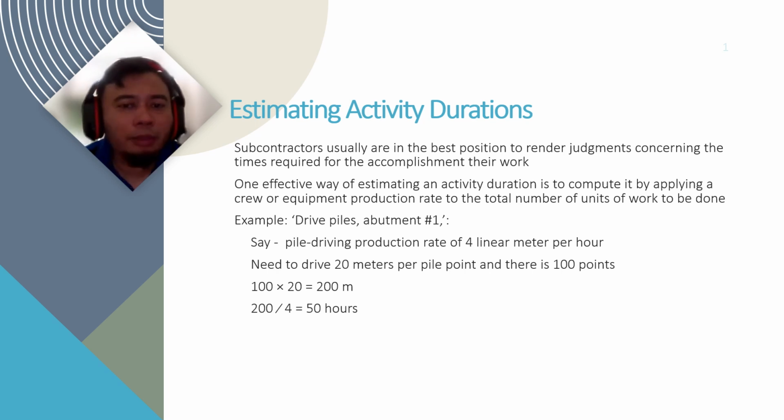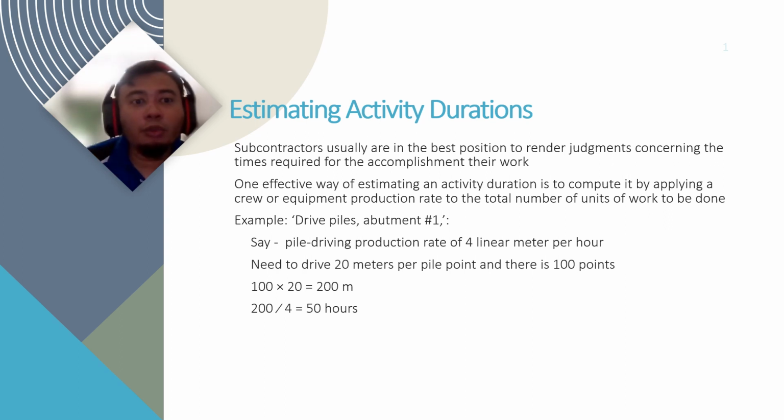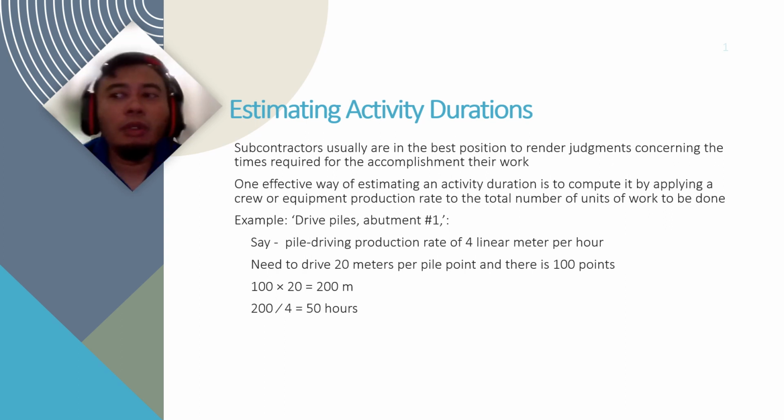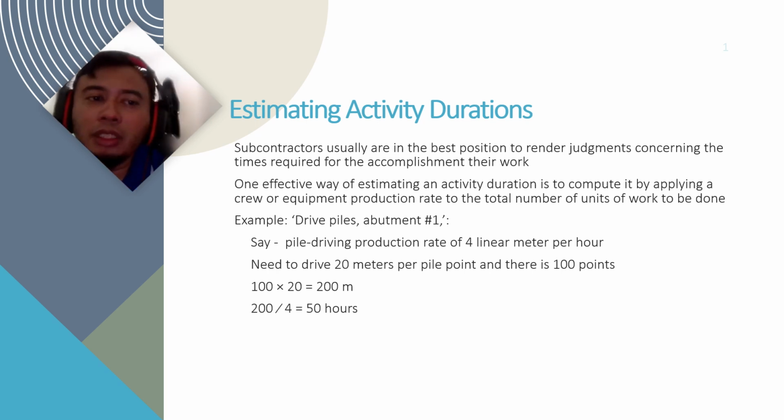Subcontractors usually are in the best position to give duration. Usually we consult subcontractors. If the project is being done in-house, you have your own site foreman, your own labor, general workers, and your skilled workers. So you can consult with your site foreman and your skilled workers on the duration of each activity.